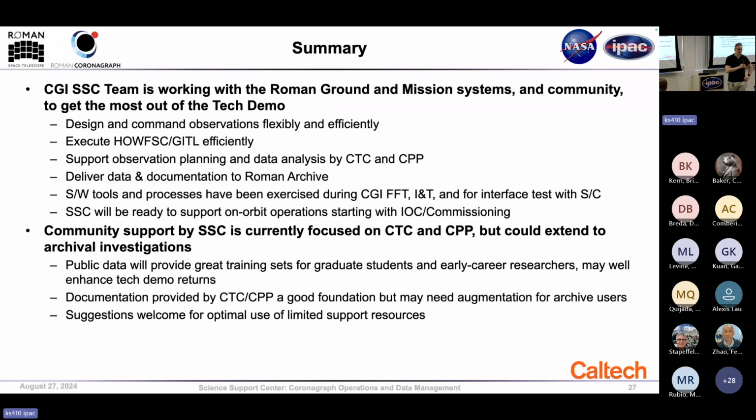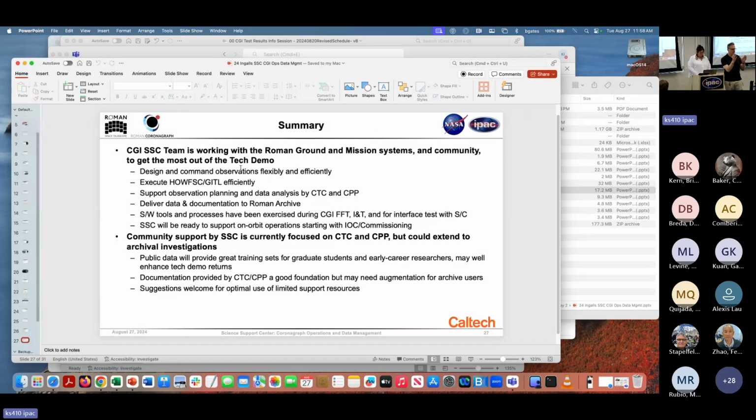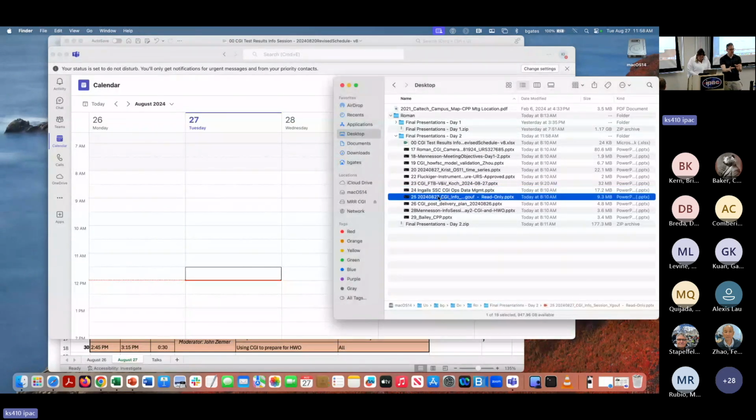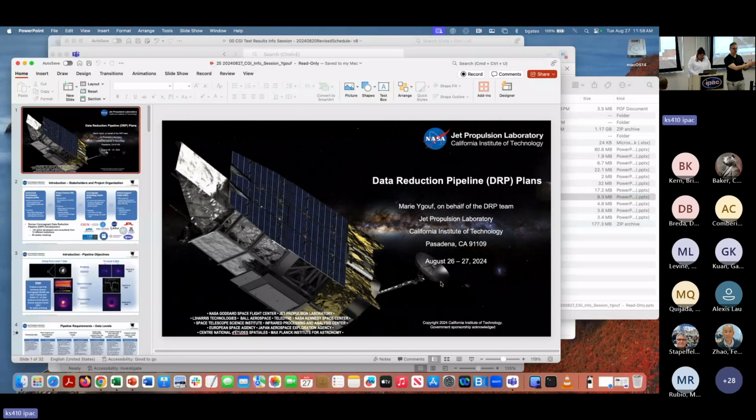Well, there was a spacecraft interface test, so the CGI was connected to the spacecraft. The commanding scripts that we've created were run from a workstation very similar to ours at the MOC. They were able to command CGI. So I would say that the risk is very small, almost zero, because the same command scripts that we'll use in flight will run from an assist command station at Goddard, connecting through the spacecraft to CGI.